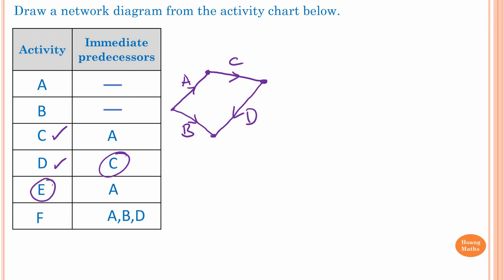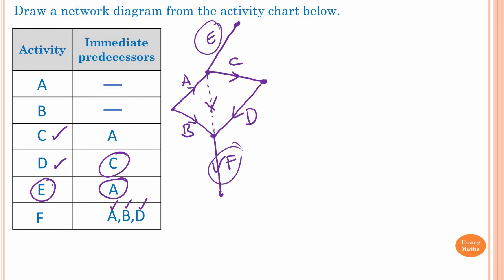For Activity E, we need to complete Activity A first, so I draw E out here — this is Activity E. For Activity F, we need to complete Activities A, B, and D first. We already have B and D, so I write F here. We then need to connect A to F as well, but we need a Dummy Activity — because drawing a solid line would mean it's an actual activity. So this is a Dummy Activity with zero weighting. We also need to connect the last two activities, E and F, together.